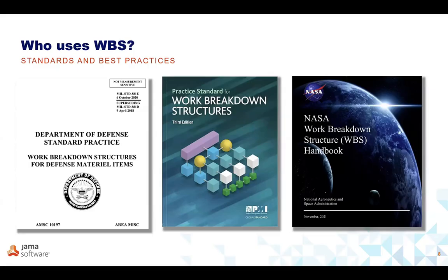A WBS has lots of standards and guidelines to assist practitioners. In many cases, following the specific guidance within the documents is mandatory. Here I've just highlighted some notable guidelines. MIL-STD-881 is required for all ACAT programs. NASA also has a very prescriptive method to implement WBS. PMI has published books and has lots of references available online for practitioners.